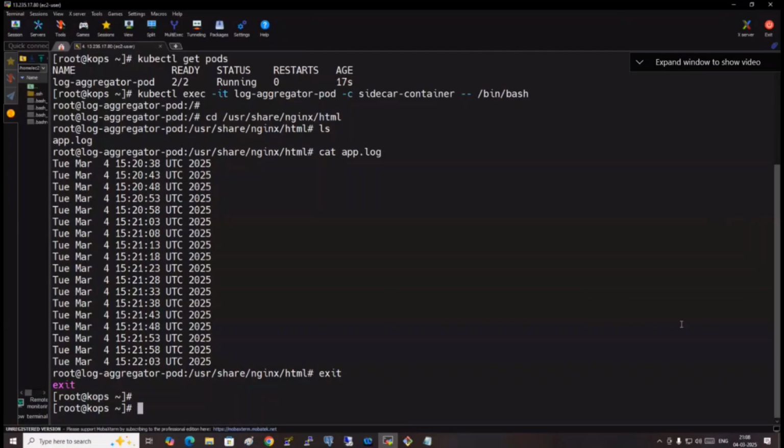All this implementation, they'll do it in 1 week. The Scrum Master will be involved in this; I told you about the Scrum Master. The team lead and the principal architect will create the tasks for all the team members, and each team member will start working on their task. Every day we'll have the Scrum meeting in the morning, and all the tasks need to be updated in Jira. Overall, I will not be sitting with the team members. I'll be sitting with the Scrum Master and principal architect. Tell me the status of this 1 week, and I'll get the status of everything on top, right?